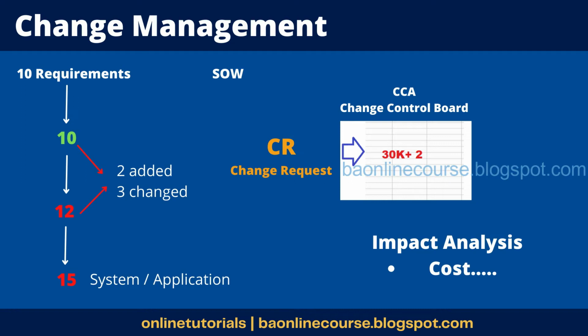Right. Now, what I told you is only for the changes coming in. But if the customer adds a new one, then that would be considered as a change request, and you have to figure out the cost and timeline effect of that. You get it? Let me explain this. Out of these 10, let's say 2 requirements we have almost finalized, but before the BRD is signed off, the customer comes and says, make these changes to this. So you should do that.